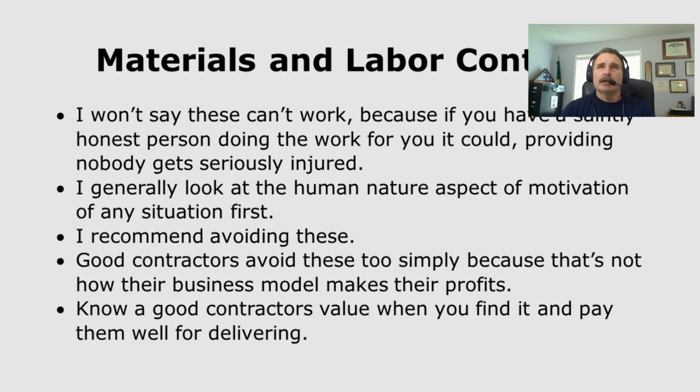These are, frankly, lawsuits waiting to happen, in my opinion. They are the least precise, most open-ended arrangement, and they very heavily favor the contractor because it's an open-end arrangement. You're paying for the labor and the materials that go into the project. It's great for the contractor if they can't estimate and can't pull together any really good numbers on a project, because it's just labor and materials.